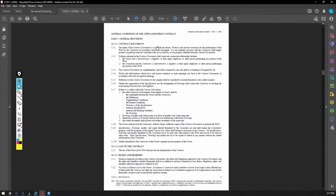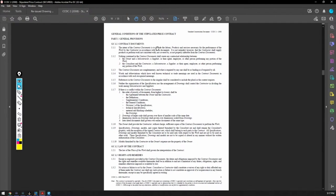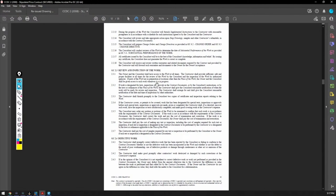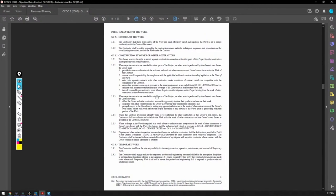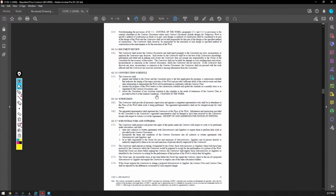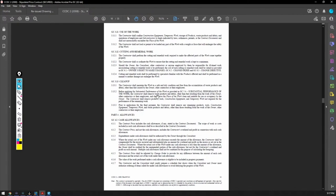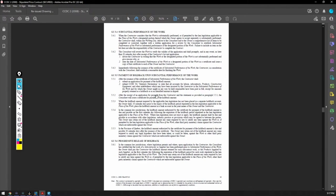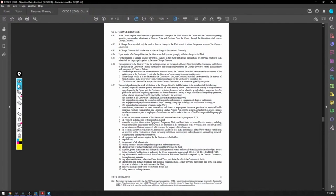This is directly between the owner and the general contractor. So the owner has no contractual relationship to the subcontractors in design bid build project. The prime contractor holds all the contracts. If anyone wants a copy of this, I think I put it up. It's in my discord under contract documents. I'm sure I've uploaded some of the stuff in the discord.